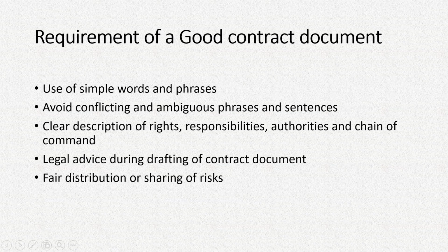And one more thing, that is the fair distribution or sharing of risks. Generally, in the Indian situation, a major share of the risk is borne by the contractor. That means if something goes wrong, if it rains heavily, the contractor will be liable and responsible for all the damages. If something unexpected happens, the contractor's interests are in many cases not protected.